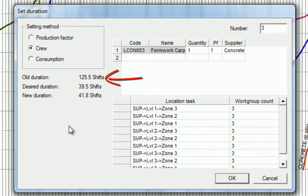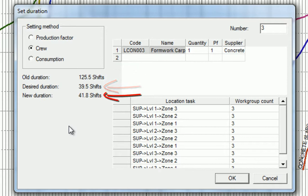See, where the old duration was 125 days, the desired duration was 39, our new duration is now 41.8.